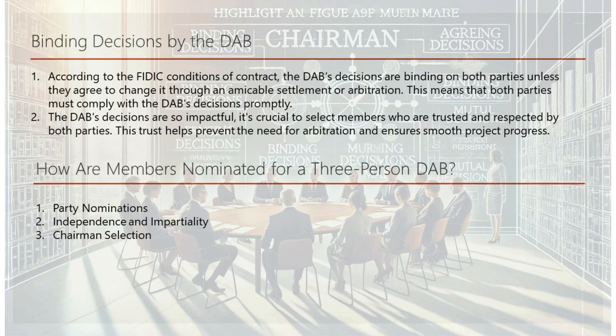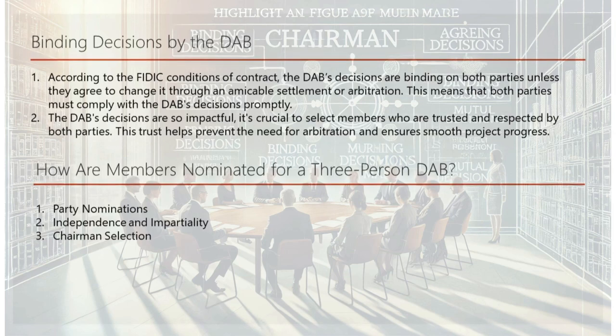Impartiality and the ability to collaborate are critical for the DAB's success. Once two members are chosen, they consult and agree on a third member to act as chairman. This can be challenging, so members might agree on a chairman among themselves before proposing that person to the parties for approval. The chairman's role is pivotal in guiding the board.